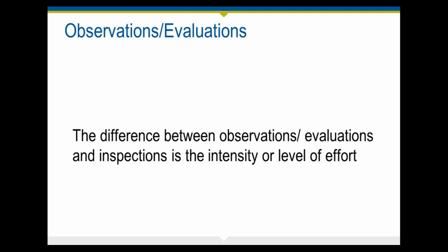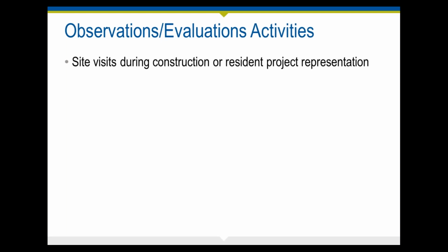review of the actual construction that has occurred and what has been done in terms of quality. You're providing, at least as envisioned in the standard form documents, what are characterized as observations or evaluations of the construction that has been put in place. So some of the activities that this could entail are site visits during construction. How often do you show up during critical junctures, critical concrete pours? What is it that you are obligated to be there for, or how often are you going to be there?